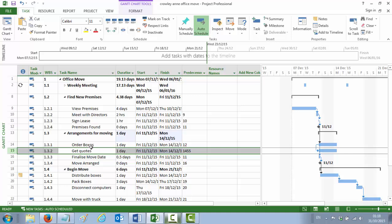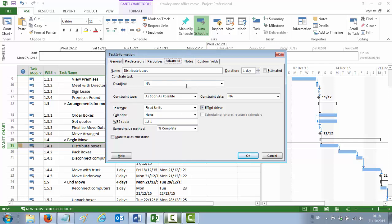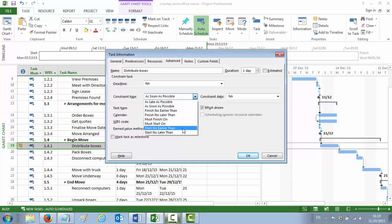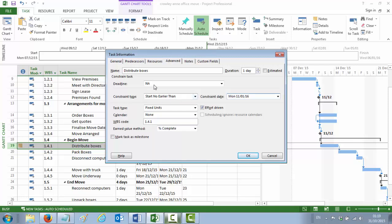Point number 12 is putting in a constraint. It tells you Distribute Boxes cannot take place until after January 11th. We double-click Distribute Boxes and go to the Advanced tab in the dialog box. You'll see a constraint type of 'As Soon As Possible' — all activities are entered into Microsoft Project with this default constraint. We're going to change it to 'Start No Earlier Than' and over on the right-hand side, scroll forward in the calendar to choose Monday, January 11th. That's now saying this activity cannot start until Monday January 11th. We say OK.